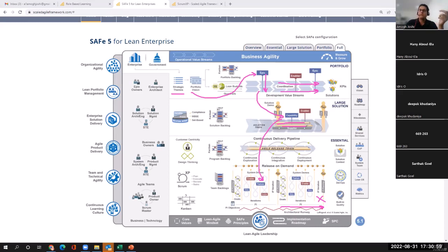Yeah, that's what we call a capability, but that can be delivered within this PI. Within this PI, we can deliver it, but it requires multiple trains. For example, enable passengers to buy extra baggage via mobile app, via website. There are 2 trains. So to deliver this, we need both the trains, but it can be delivered within a program increment.